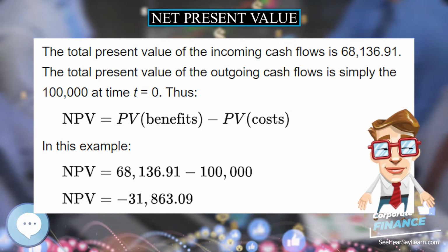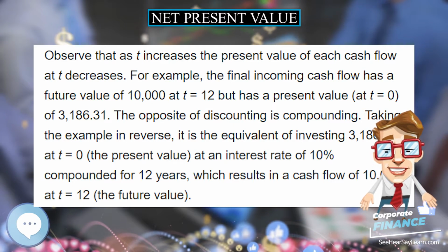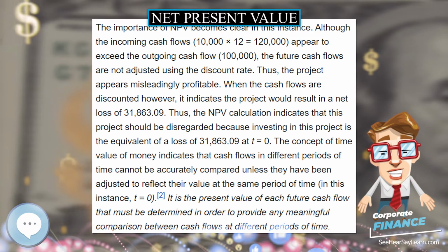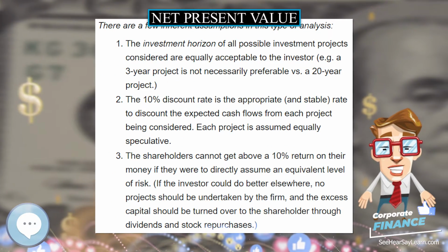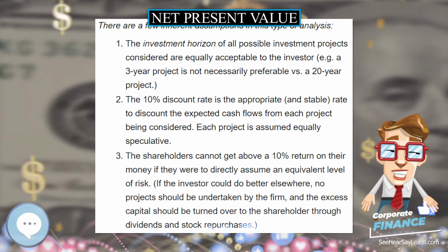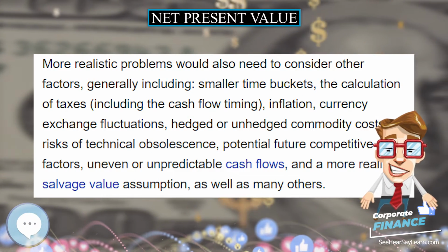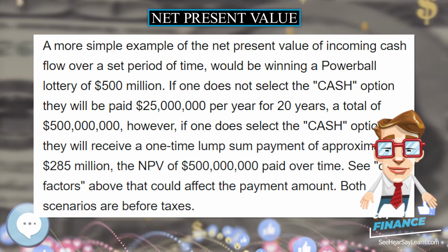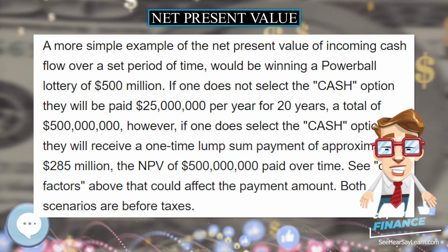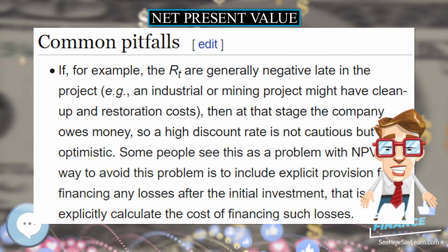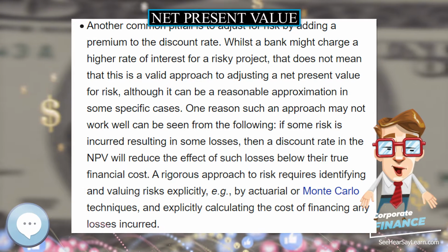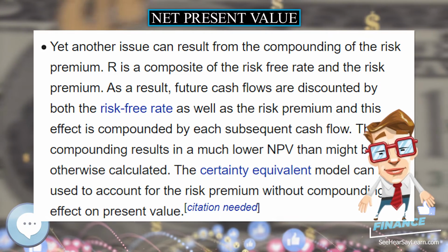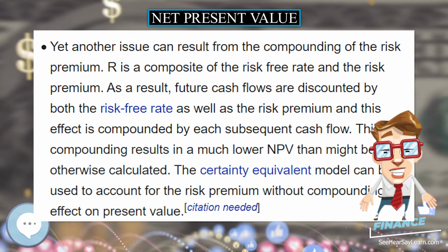Because of its simplicity, NPV is a useful tool to determine whether a project or investment will result in a net profit or a loss. A positive NPV results in profit, while a negative NPV results in a loss. The NPV measures the excess or shortfall of cash flows, in present value terms, above the cost of funds. In a theoretical situation of unlimited capital budgeting, a company should pursue every investment with a positive NPV. However, in practical terms, a company's capital constraints limit investments to projects with the highest NPV whose cost cash flows, or initial cash investment, do not exceed the company's capital.